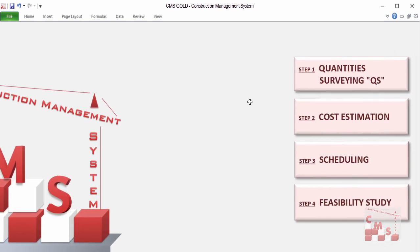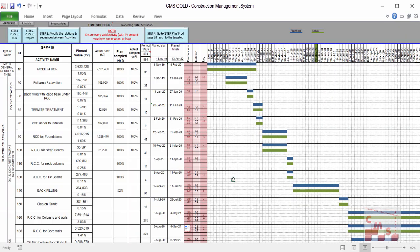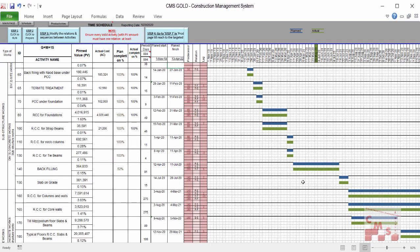For CMS Gold, further to quantity surveying and cost estimation, it can provide a time schedule and feasibility study automatically. After CMS calculates the budget and detailed price for each activity, using the logic sequence between all activities and common productivities for each manpower type, CMS will develop a time schedule automatically. It will produce all activities with their planned value, weightage against project value, the percentage each activity represents, the duration required for each activity, and the planned start and planned finish.